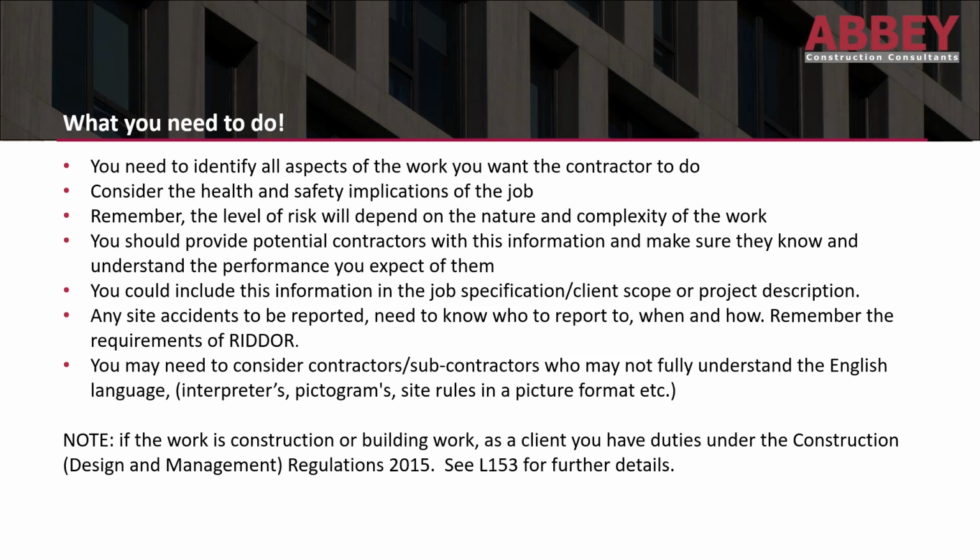You need to identify all aspects of the work that you want the contractor to do. That includes the hidden, the high level risk, and the obscure elements, which should all be identified up front. And then consider the health and safety implications of that work. Where will they be working? What's surrounding that environment? What will there be interaction with, for example forklift trucks, transport, other contractors working on the same site but in different sections? And remember, the level of risk will depend on the nature and complexity of the work.